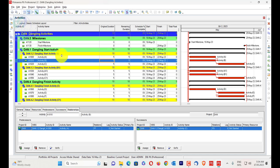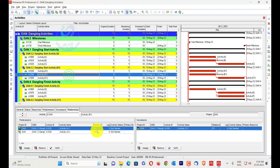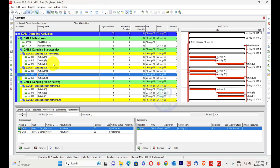How can you resolve this? You simply assign a start-to-start relationship to it. I will show you the tool which can gather from 1,000 activities what are your dangling activities and how to resolve them.